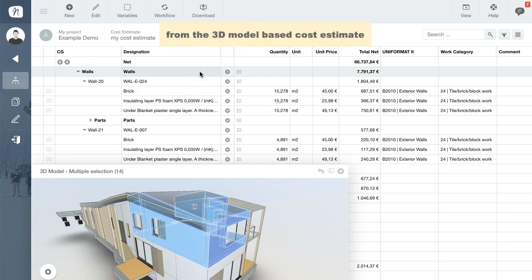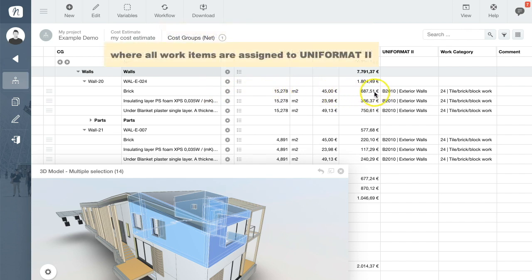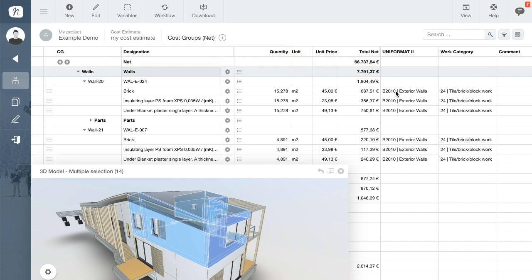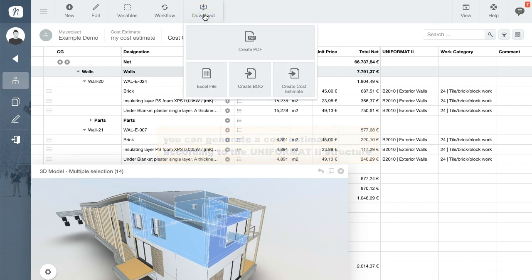Hi, back again. From the 3D model-based cost estimate in which all work items are linked to UNIFORMAT2 code, with one click you can generate an additional cost estimate configured according to the UNIFORMAT2 structure.